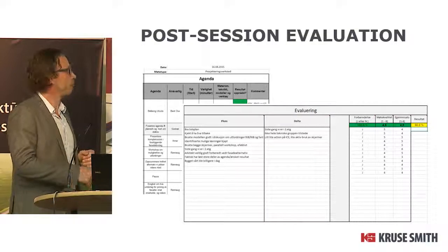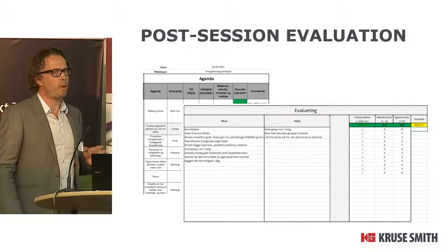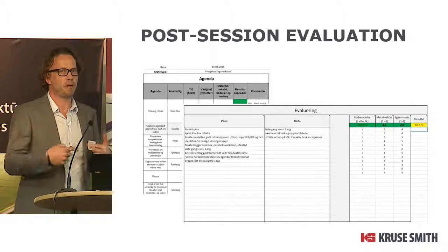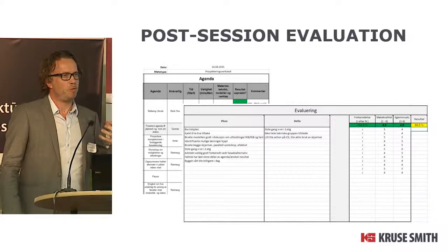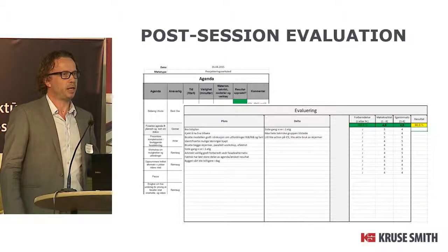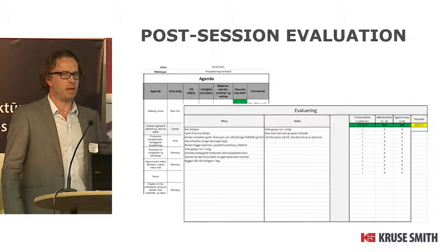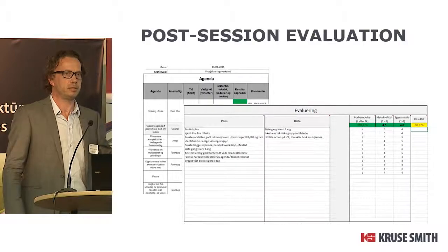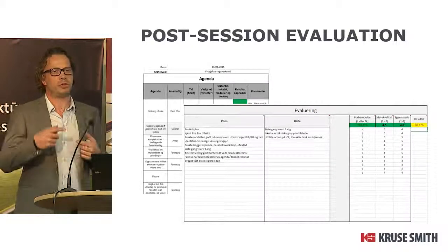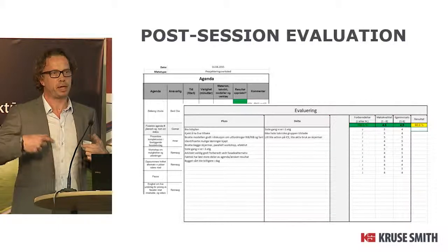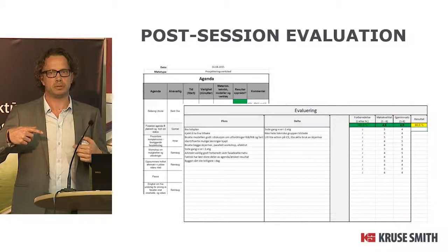We also ask every participant how meaningful and timely the meeting was, in their opinion, from 1 to 6. That is done to avoid asking participants who aren't really interested or engaged in the team for that session, because then we need to plan it better. And we also ask them, how did you contribute to make the meeting as meaningful as possible?